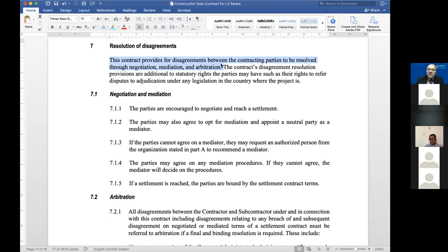Because in many cases, in court or in arbitration and adjudication even, it has been argued by lawyers that, oh, a dispute hasn't crystallized, and a dispute needs to be crystallized as defined in law. And the parties are saying, oh, you can't come to arbitration. Why? Because, you know, I know you put in a claim, but it hasn't been completely rejected. Therefore, there's no dispute yet that you can bring to arbitration. Really? Forget that.